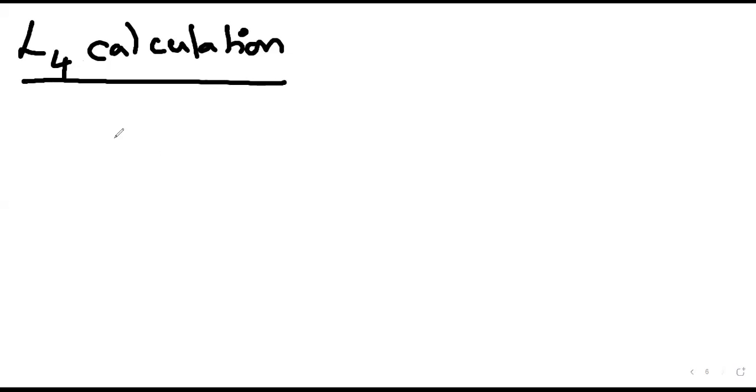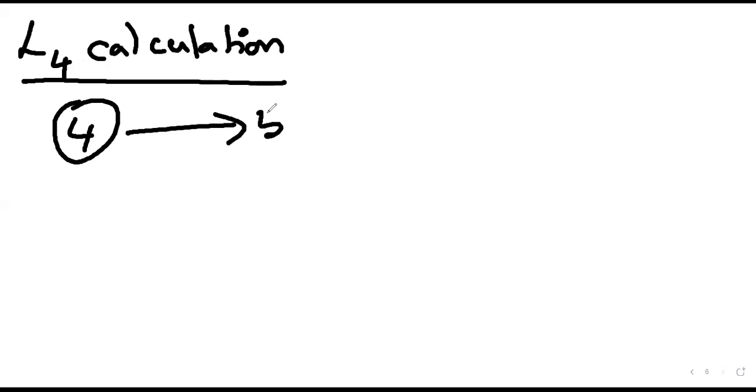So next is the L4 calculation. Now we are coming in the reverse direction. For L4, we have to see how many activities start from the fourth node.